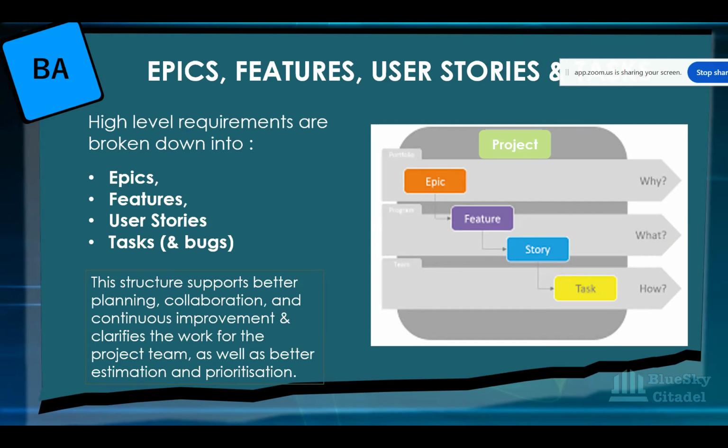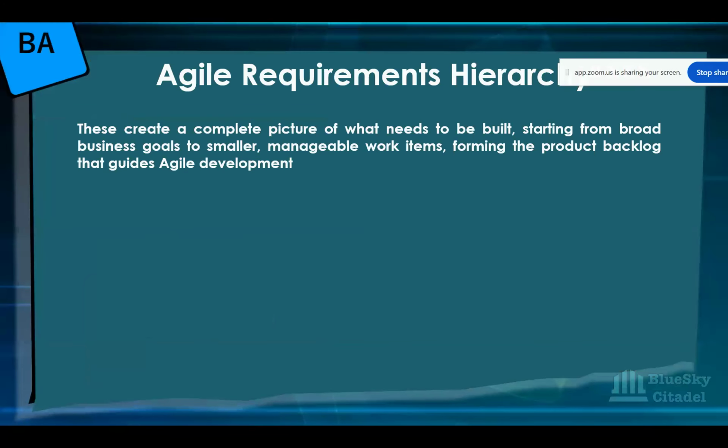Otherwise, everything is just jumbled together. You don't know what comes first, what comes second. How are we going to build this thing that we're all saying that we want to have at the end of the day? You know what the overall picture is, then you now break it down into chunks. So remember, it's agile, it's broken down into sprints. So sprint 1, we're working on this particular area. For sprint 2, we're working on this particular area. For sprint 3, we're working on it, we're delivering it, it's done. Then we're moving to the next one. It's not like we're working on it and leaving it unfinished, though. We're working on it, we're delivering that piece. Once it's done, we move over to the next piece. Okay, so that's basically how this works.